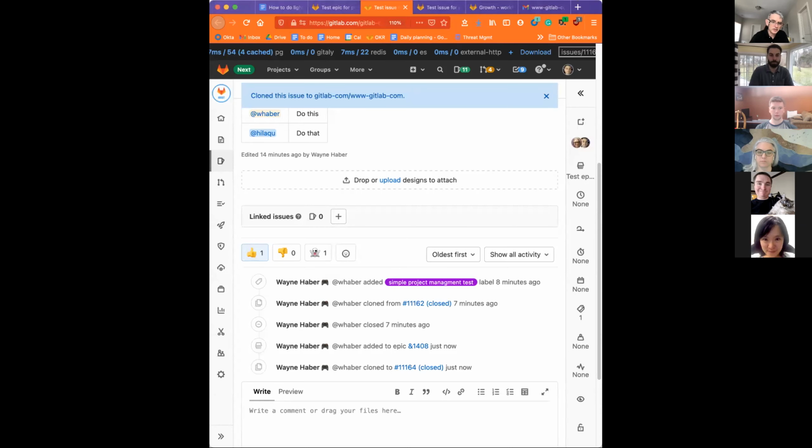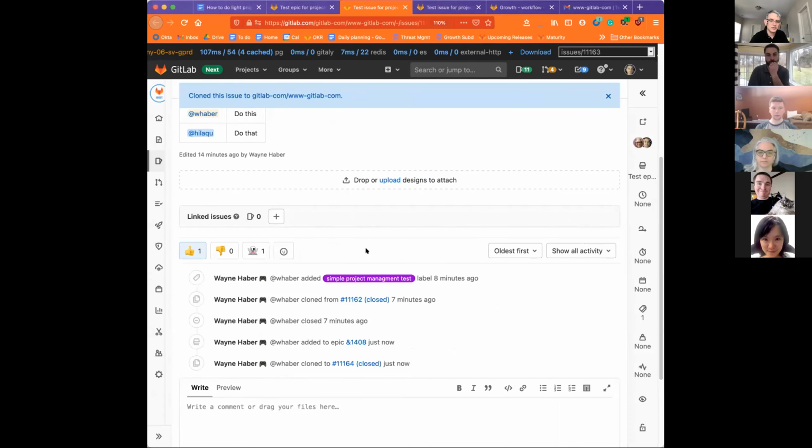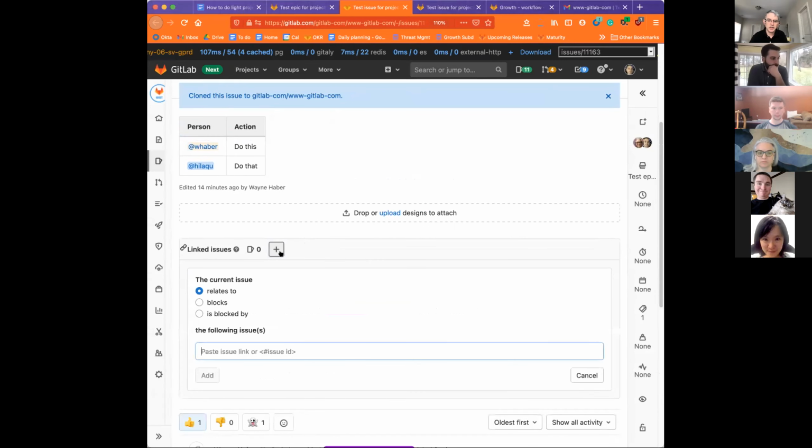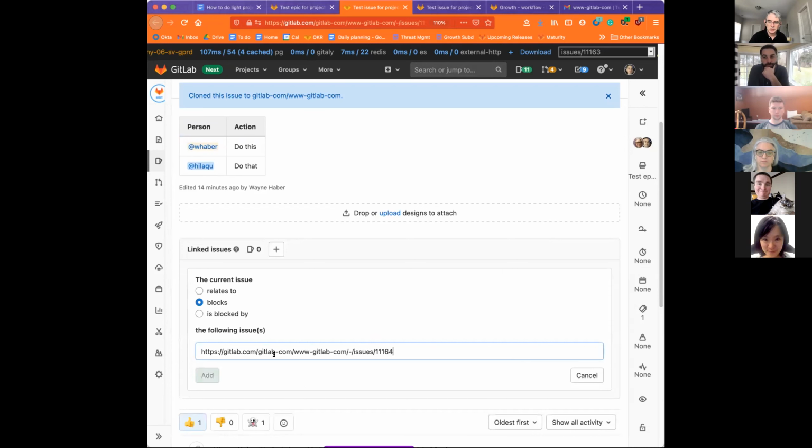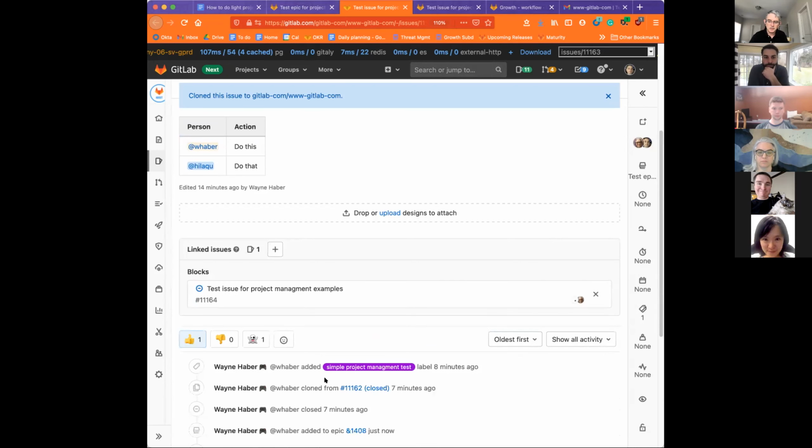So this is not a perfect answer to what you're looking for, Sam, but it's what I do in those kinds of situations. When I do a linked issue, I'll do a blocks or is blocked by, and then I'll choose the issue there. And just add, this is probably the same one again, but okay. So here it says it blocks, so it shows up in a different list.